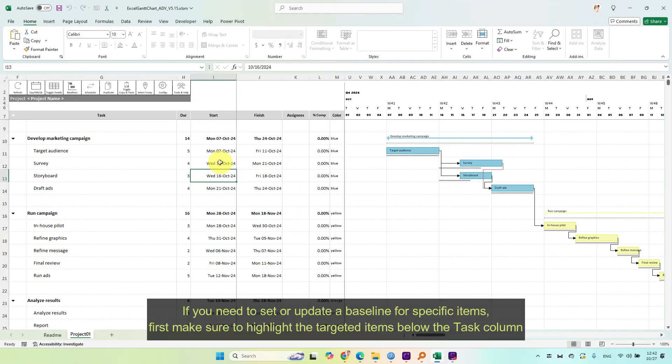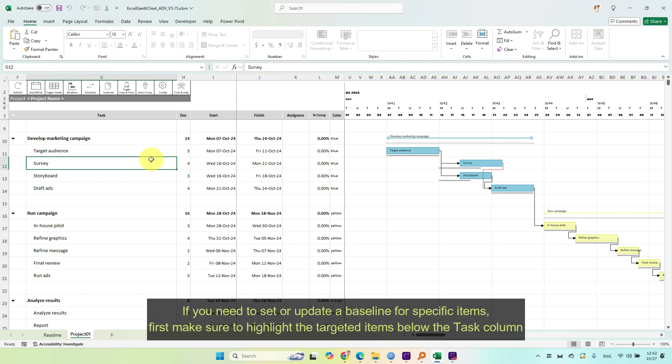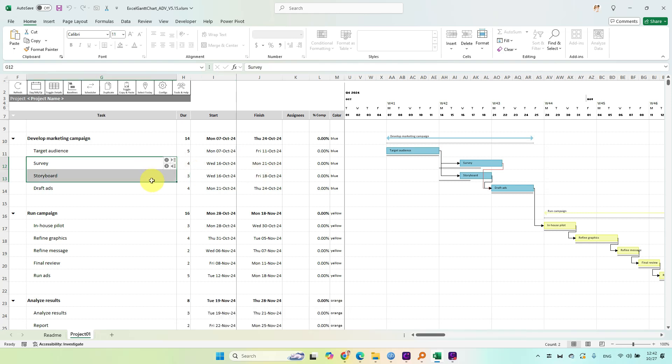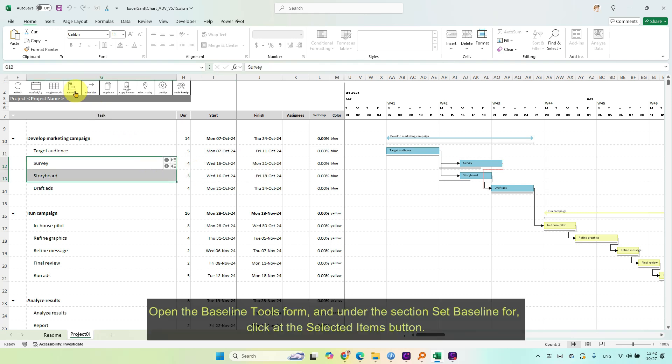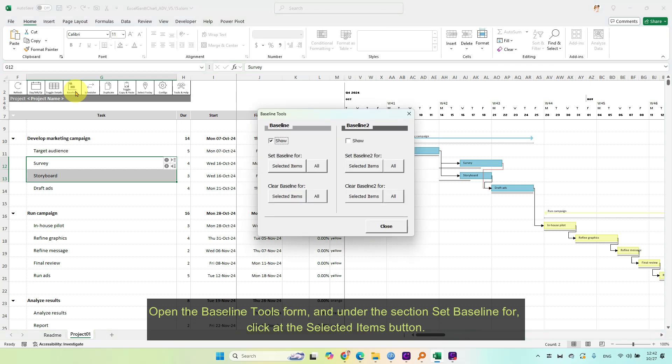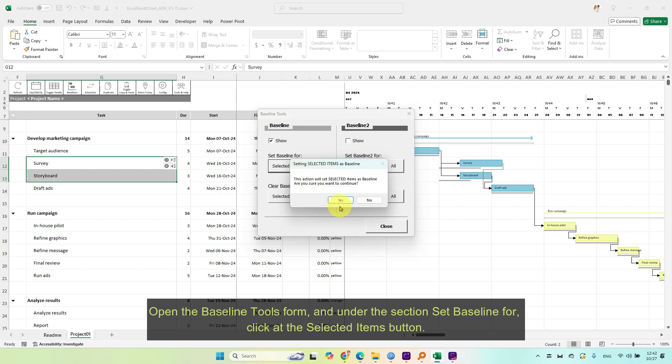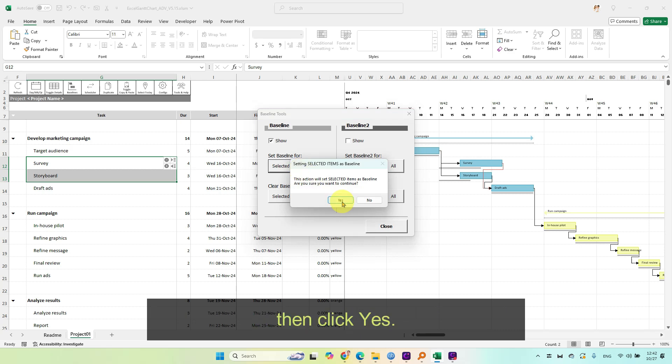If you need to set or update a baseline for specific items, first make sure to highlight the targeted items below the task column. Open the baseline tools form and under the section set baseline for, click the selected items button. Then click yes.